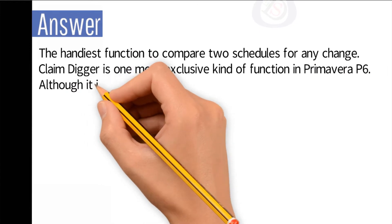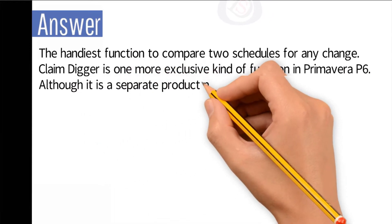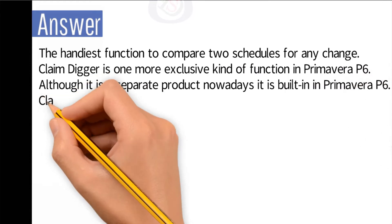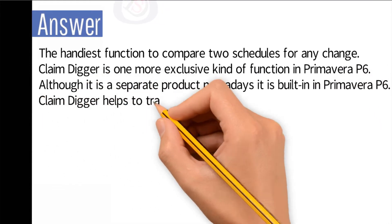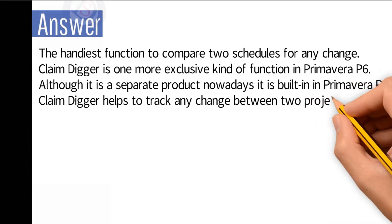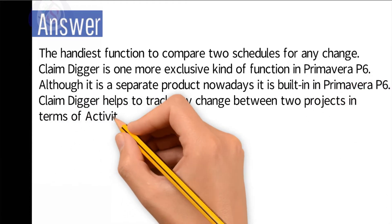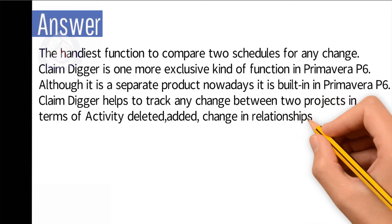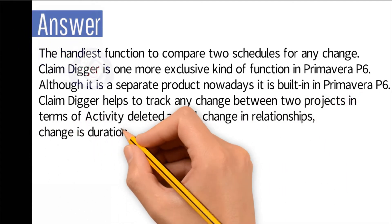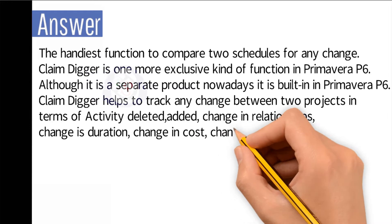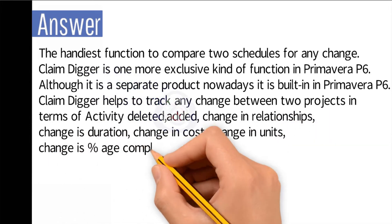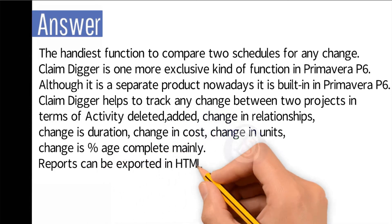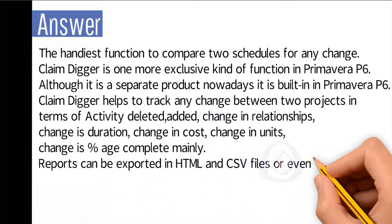Although it is a separate product, nowadays it is built into Primavera P6. Claim Digger helps to track any change between two projects in terms of: activity deleted, added, change in relationship, change in duration, change in cost, change in unit, change in percentage complete. Reports can be exported in XML and CSV file or even text.